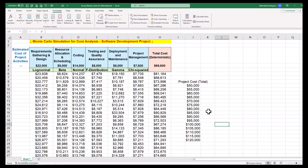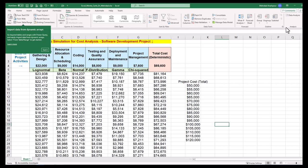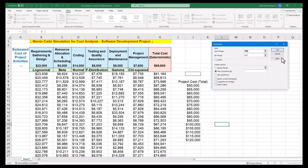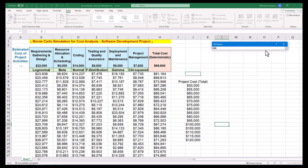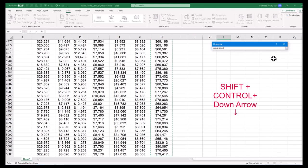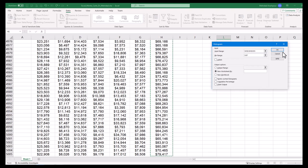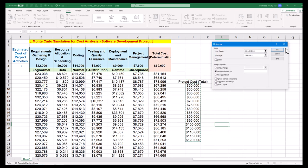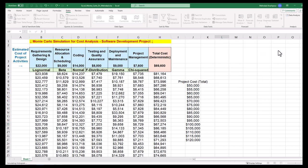To draw the histogram, navigate to the Data tab and click on the Data Analysis add-in. From the list, choose Histogram and press OK. For the input range, select the simulated total costs by clicking the first row and holding Shift+Ctrl+Down arrow to select all 5000 values. For the bin range, select the range for total project costs specified earlier. Check the two tick boxes for cumulative percentage and chart output. Click OK and the chart is created in a new sheet.